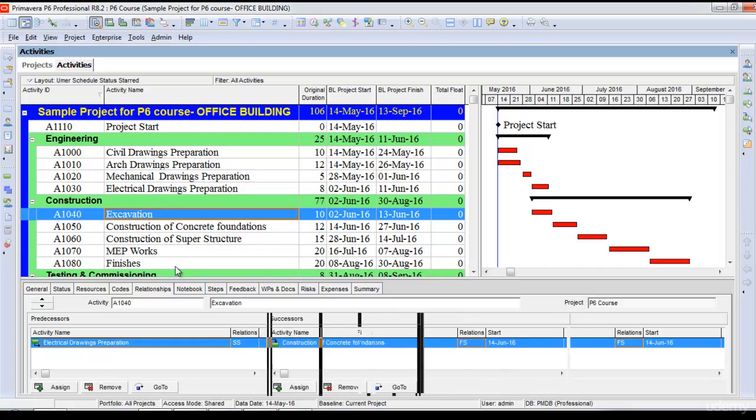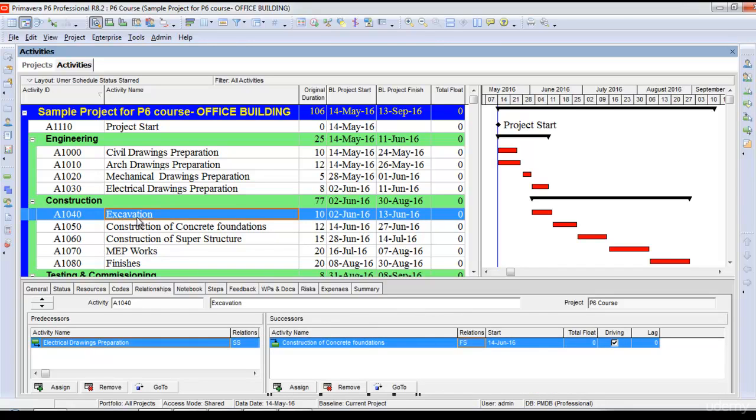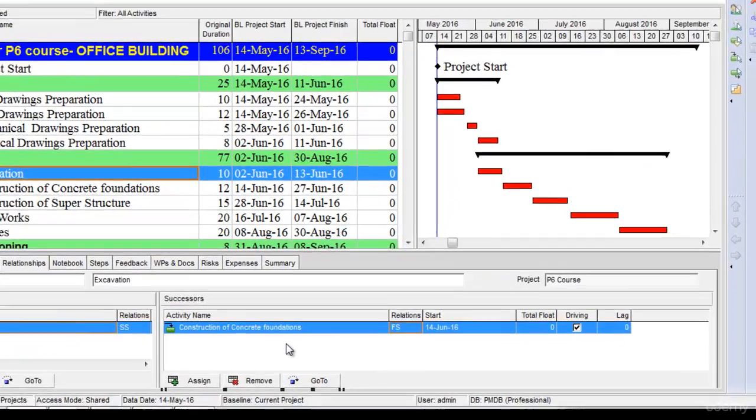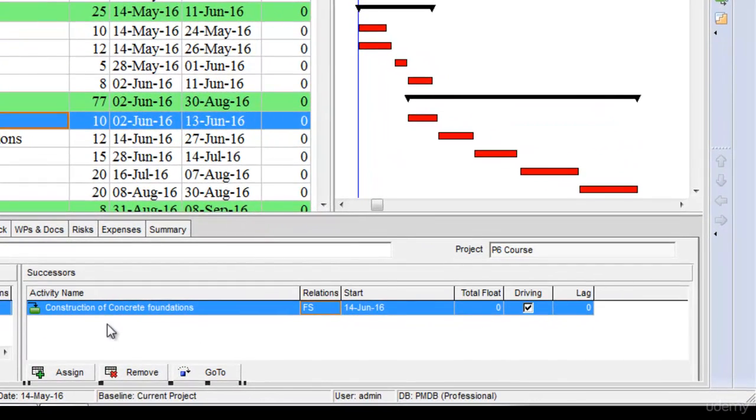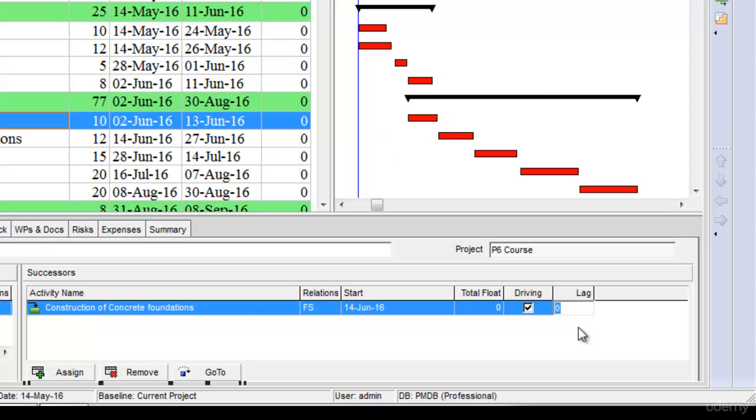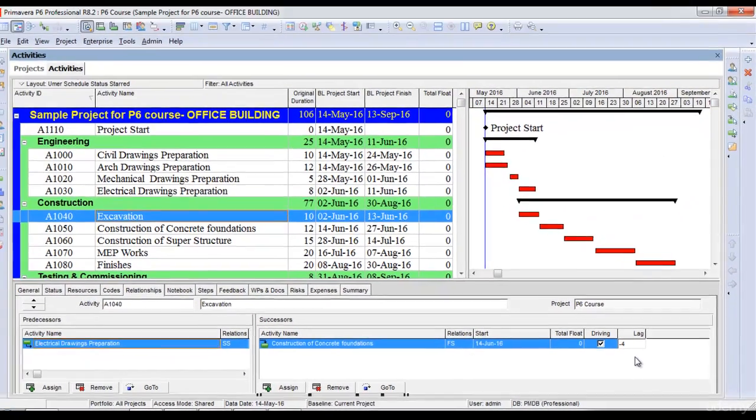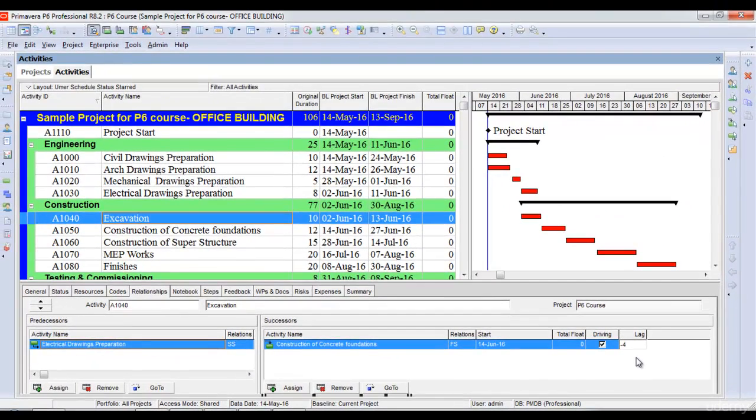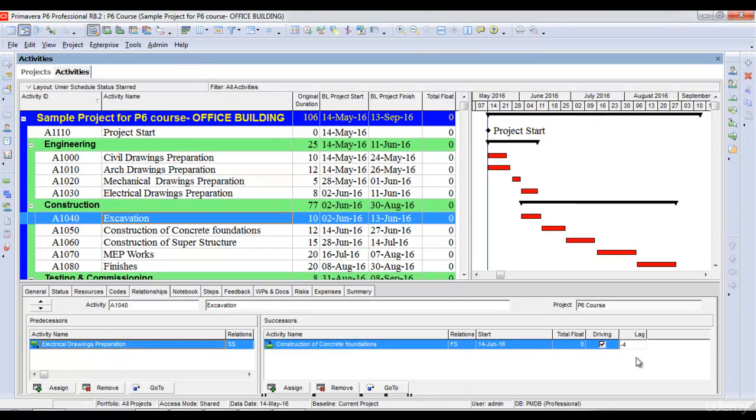I'll highlight the excavation activity, go to the successor side, and select lag. I'll put a lag of minus four days, which means the successor activity, construction of concrete foundations, will start four days before the finish of excavation.